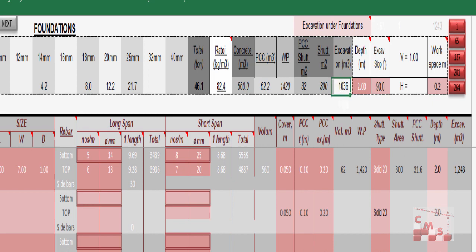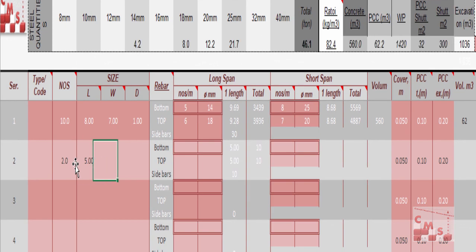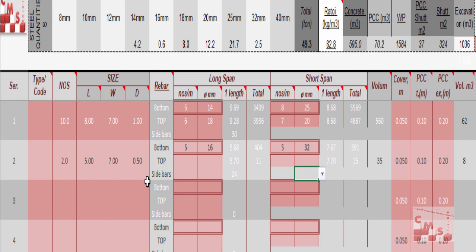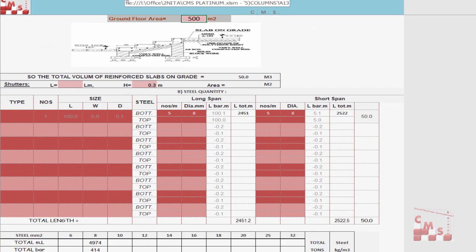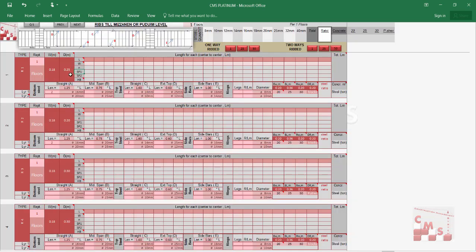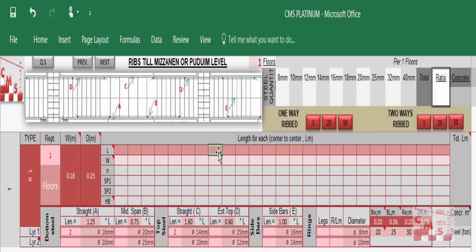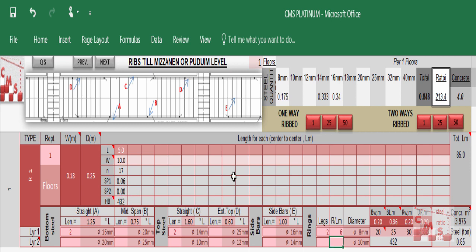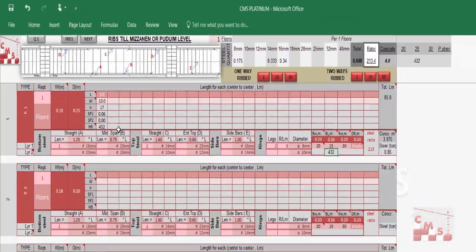Also the type of shutter — block, wood, or whatever — and the excavation quantity. The same can be done for any other types of foundation; CMS gives you quantities according to your new inputs. The same applies to all substructure and superstructure work, and these outputs from CMS are reflected directly in all other project aspects. For a ribbed slab, you just enter the length and width of the slab and the reinforcement of the ribs.